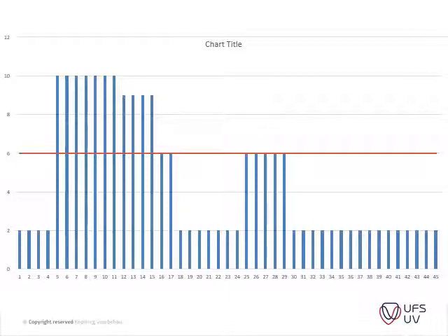Now the example continues to indicate the maximum amount. The problem with the contractor is that he only has 6 joiners available to work on this project. If the project completion date is not to be extended, the only solution to the problem is to level the labor demand within the program according to the number of joiners available. This means adjusting the work activities within the available float, but obviously not the critical ones, to reduce the peak labor demand situation.